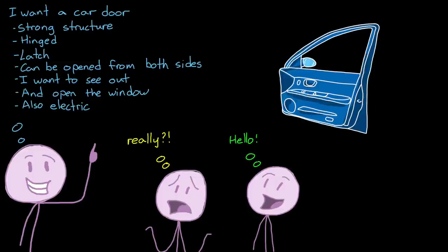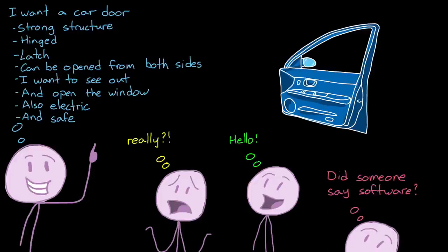Yeah, well, this is close, but you also don't want the window to crush fingers if it closes on them. So now you need sensors and software to manage the safety element, and so on. And this sort of explore as we go approach can allow us to quickly jump into a project and make progress early on that we can learn from. However, it can also create a work and rework cycle that's expensive and time-consuming.